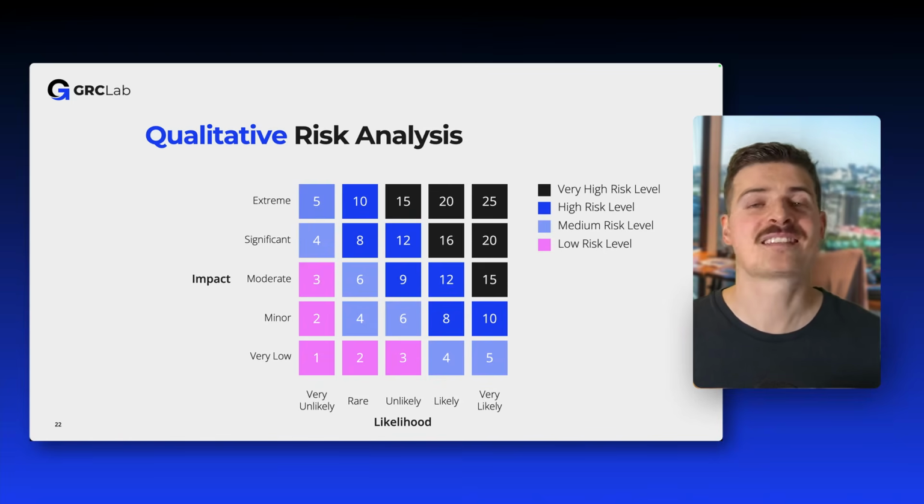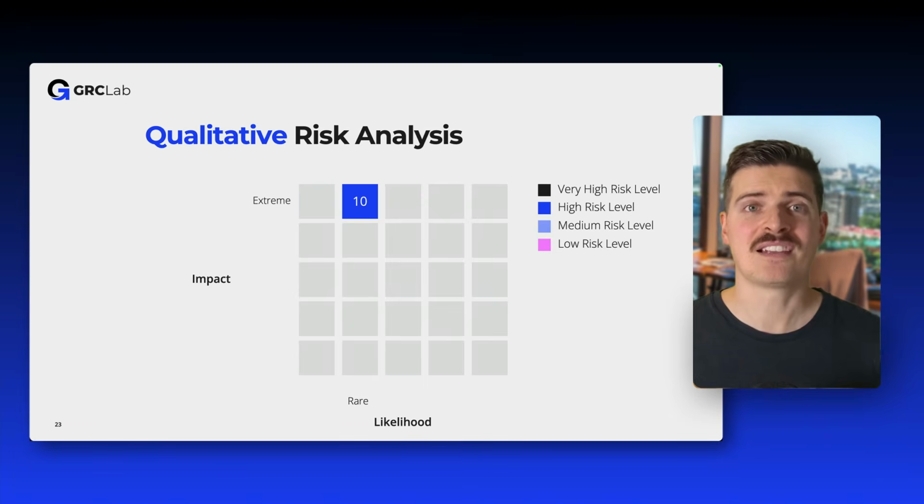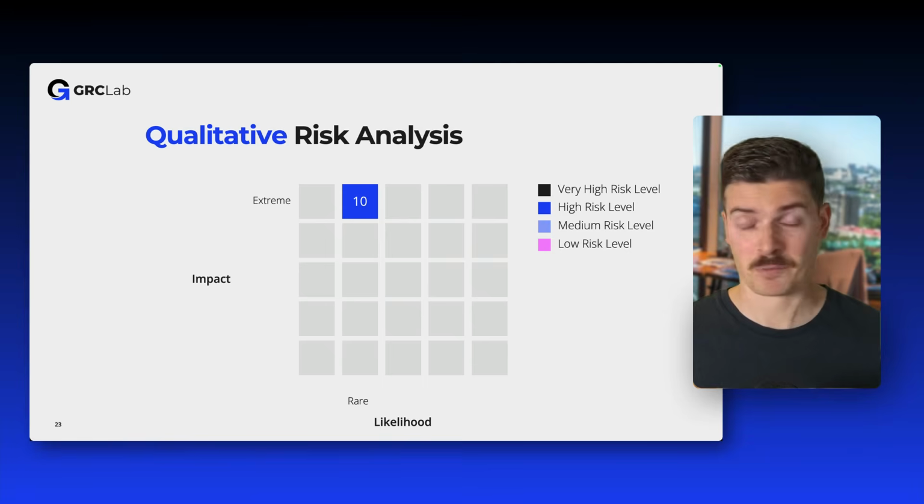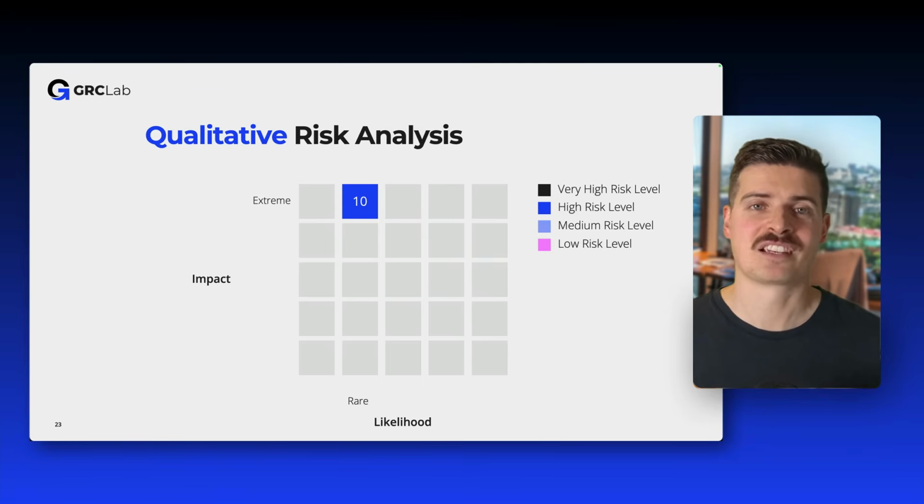Here, we're using a semi-qualitative scale by adding numbers to our 2 dimensions. So we'll simply add numbers 1 to 5 for each dimension, and by multiplying them, we get to the risk level in the middle. Now, in the case of the volcano scenario, the corresponding level of risk is high. That's what I assume. This is highly subjective, as no further guidance here is given to you on how to determine the probability and impact of a risk. But this is, of course, up to you to decide.